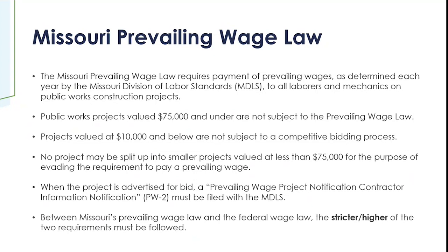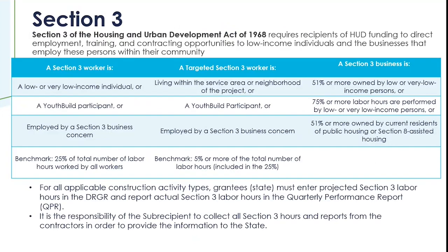There is a prevailing wage law checkoff list, and there's an affidavit of compliance with prevailing wage law, which contractors must submit to the Department of Labor prior to requesting the final payment of public funds. The forms are available on the CDBG website, and they are linked to both the federal websites and the Missouri Department of Labor website as well. The items on this next slide are additional notes about the process, including where you might find acceptable weekly payroll documents, which include all the required detail and content. The website also shows the rules around submitting prevailing wage documents in their form and using the right format.